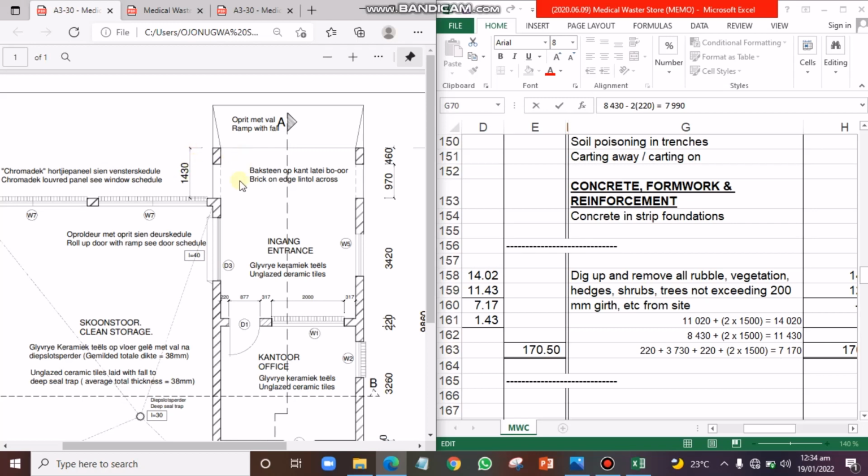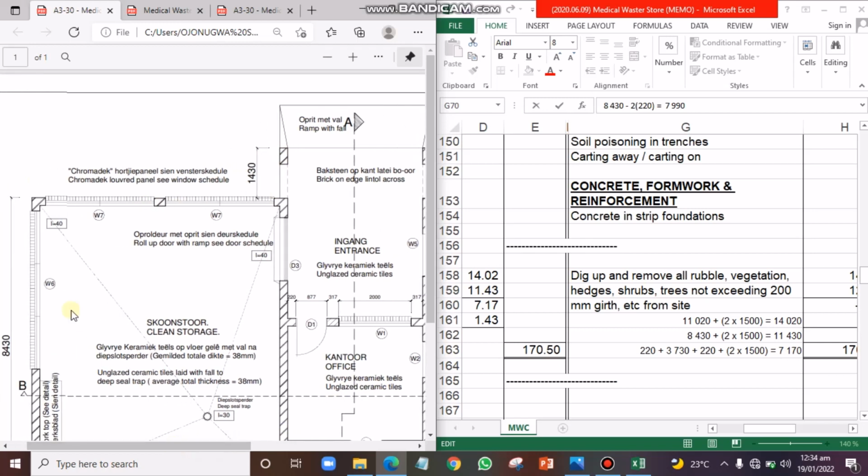So just bear in mind that whenever you have this kind of structure and there is a projection this way, if you've added the working space to this first length along this vertical space, then you don't have to add it along this vertical anymore, because what is added to this first one has taken care of the additional space for the rest of them.